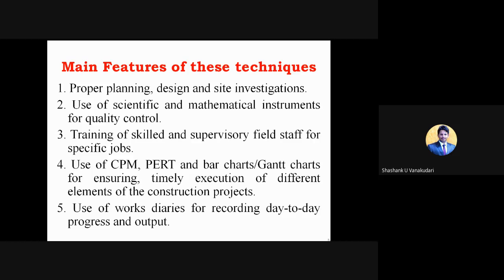And use of work diaries for recording day-to-day progress as well as the output. We can maintain a daily progress report, that is DPR, and we can maintain that by using these techniques. Like what exact work we have done today, and what about the progress as per the planning. Each and everything we can track by using this DPR, that is daily progress report.